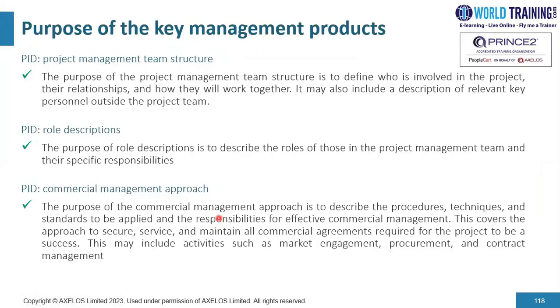Moving on to the next topic, some of the key management products relevant to the organizing practice are the following. We have the project management team structure as a part of the PID document. The purpose of the project management team structure is to define who is involved in the project, their relationships, and how they will work together. It may also include a description of relevant key personnel outside the project team.